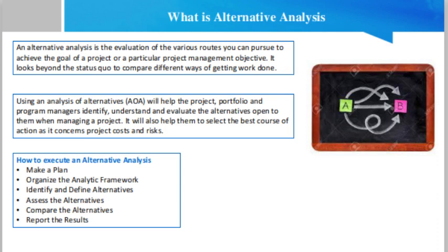When managing a project, the alternative analysis should be part of your decision making. It lets you find the best way forward. To do this, you will need to create a study plan. It will act as a roadmap for how your analysis should proceed and explain who is responsible for what. You can't do an alternative analysis without first devoting the time and resources needed.